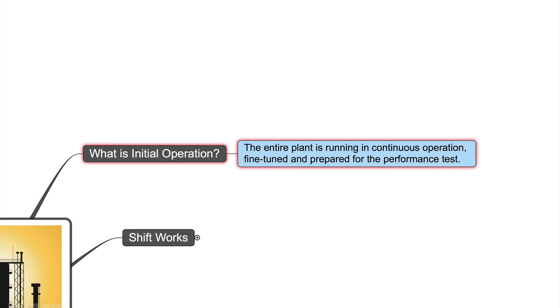What does it mean, initial operation? It means the entire plant is running in continuous operation, fine-tuned and prepared for the performance test. Our EPI doesn't say anything here as well.